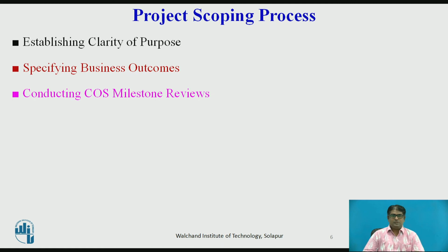Conducting COS milestones. The COS is not a static agreement, it is a dynamic agreement that becomes part of the continual project monitoring process. The situation changes throughout the project life cycle and so will the needs of the client, which means that the COS will change. Review the COS at every major project milestone.